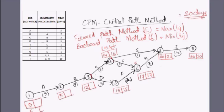At node 3, there are also two backward arrows. One gives 16 minus 2 equals 14; the other gives 15 minus 3 equals 12. Since 12 is the minimum, the latest occurrence at node 3 is 12. Continuing backward, there is just one arrow to node 2: 12 minus 7 equals 5. Finally, at node 1: 5 minus 5 equals 0.